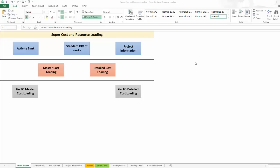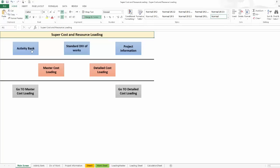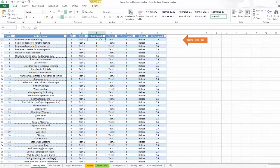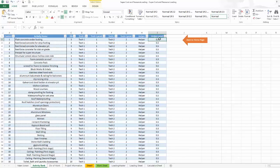This is the Super Cost and Resource Loading Sheet. It is very straightforward yet very effective and time-saving. First of all, you can identify all your activity lists here as a bank — a bank of activity list. You need to put a Control ID for each activity. This is like a bank that grows with you; each project you make, you will add more activities with productivity for your reference.